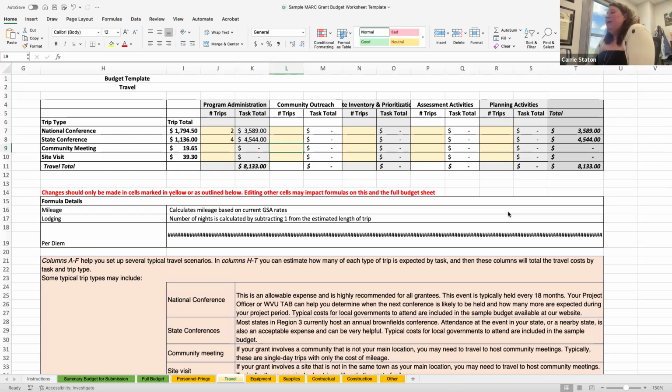So let's assume that about half of them for our purposes here are going to be in person. So 4 quarters over 4 years is 16, but only half, so 8. I'm just going to break that math down a little slower. So if you have 16 quarters in your period, you're going to have 16 community meetings, but only half of those are going to be in person. So let's call that 8.